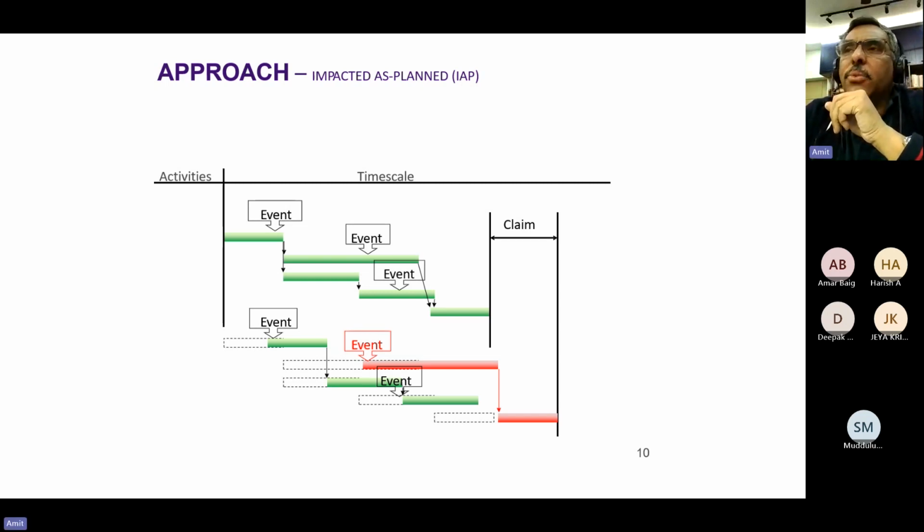Now, COVID impact lasts for 4 months. In those 4 months, I haven't given any EOT to the contractor. So, therefore, the contractor is working without any completion date. Absolutely. He has no target because he doesn't know how much EOT he will get. So how does he know how many resources to put when he does not even have a completion target?